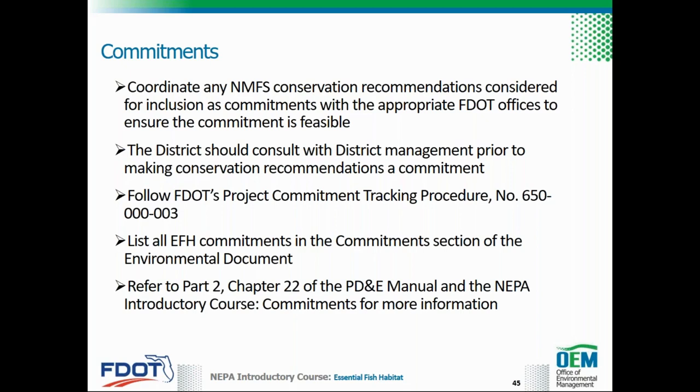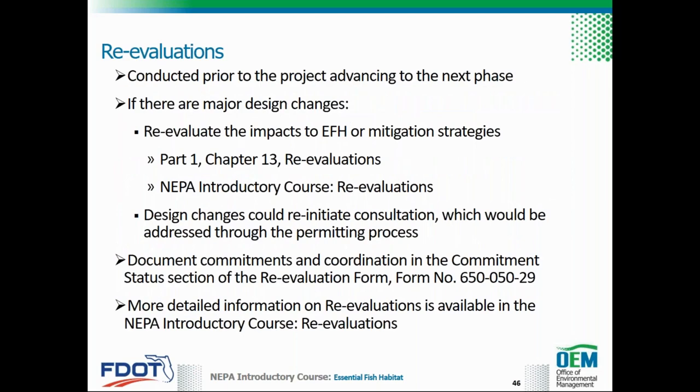Please note that more detailed information is available in Part 2, Chapter 22 of the PD&E Manual and the NEPA Introductory Course Commitments. Prior to the project advancing to the next phase, for example, from design to construction, the impacts to EFH or mitigation strategies are reevaluated per Part 1, Chapter 13 of the PD&E Manual. A reevaluation should also be conducted if there are major design changes, such as a shift in alignment or a change in the size or number of bridge piles. In addition, design changes could reinitiate consultation, which would be addressed through the permitting process.